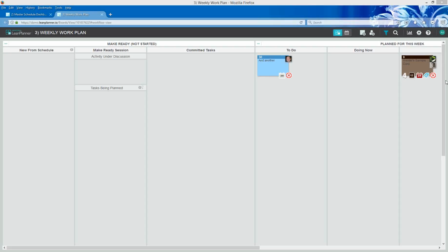But it would be helpful during CA, for the 2 to 4 week look, if we understood what RFIs were coming in, what shop drawings were coming in, whatever was coming in, and when it was coming and how much time we had to get it back out and who it was going to. So is it coming through the architect and going to the engineer and coming back to the architect from the engineer and then going back out, or whatever the case may be.